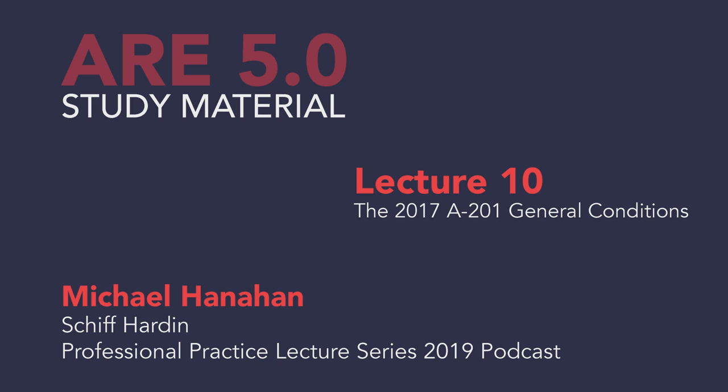Okay? The designation in writing is where the owner needs to identify, here is my project representative. This is the individual that will speak on behalf of me. Sometimes it's an employee of the owner's company. Sometimes they hire an outside company that speaks on behalf of the owner, depending on the complexity of the project and the sophistication of the owner. But you need to have that individual, or designated couple of individuals, who are the people that talk to the contractor. Nobody else. You don't want one vice president from the owner showing up and telling the contractor, this is the way my office should be, and another vice president coming up and saying, no, you need to change these hallways. You want a single point of responsibility. So that's what that does.